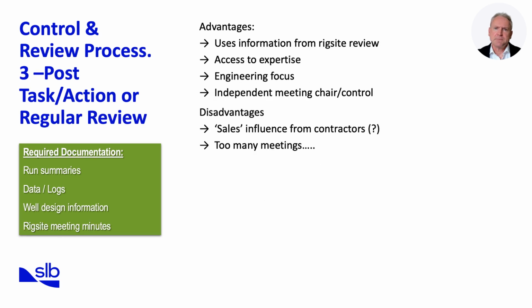The third review type is the post-task, action, or regular review, which is usually held after a sequence of operations or on a scheduled basis. Unlike the rig site review, this process brings in more expertise and shifts the focus toward engineering analysis. One of the advantages is that it uses the raw information gathered at the rig site and then adds professional interpretation. With access to technical expertise and an independent meeting chair, the review gains stronger control and reduces bias. The discussion is more structured, and the engineering perspective ensures lessons are captured at a design level.